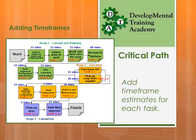With the critical path, you start adding time frames. You'll notice task 1.1 has dropped off the bottom. We've got 15 minutes, 15 minutes, 15 minutes, 60 minutes, and so on — every single activity has a time frame allocated to it. At this stage they would be estimates, based on past experience, knowledge, recommendations, and your own research.